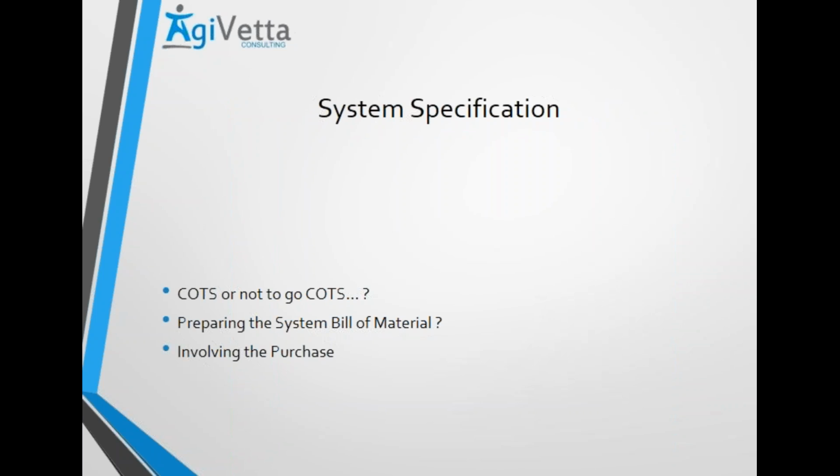So one option when you get into system specification is to think about which components we would take from those generally available in the market, and which components we probably do not have the capability to get from the market and will manufacture them. So during the feasibility study stage, during the conceptualization stage, the product owner or the product manager would have to work along with the design engineers to think about which devices we can use off the shelf.